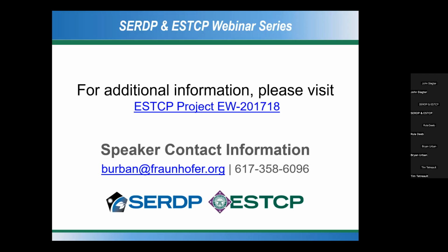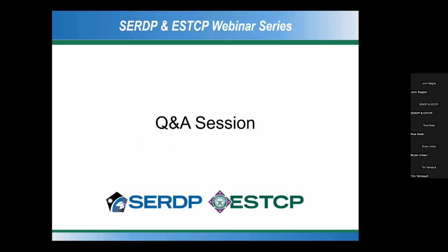The second piece is this system we did not integrate with any DoD control system. So it was fully standalone, did not connect to the internet. So that greatly reduced the boundary or the things that you need to worry about. In addition, part of the cybersecurity framework is keeping track of users and passwords and who gets in and who has what access. And so you'll have to work closely with the base on all of those elements. But really the key is setting up the system using the vendor's best security practices. So you look at their manual, you turn on encryption on the network, a couple things like that. But it wasn't anything outlandish.